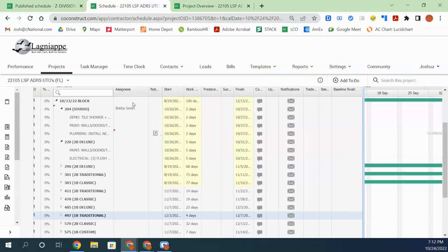Assignees, run through that one. Every item on your schedule needs to be assigned to someone. We talk a lot about the 3 W's at Lanyap. The 3 W's are: what is it, who is responsible, and when. What, who, and when.